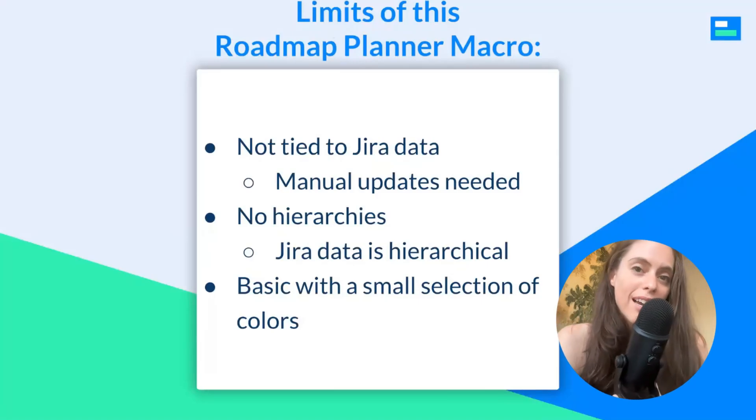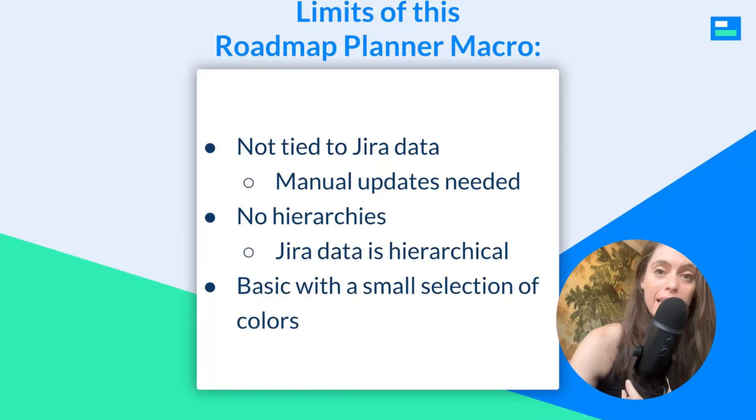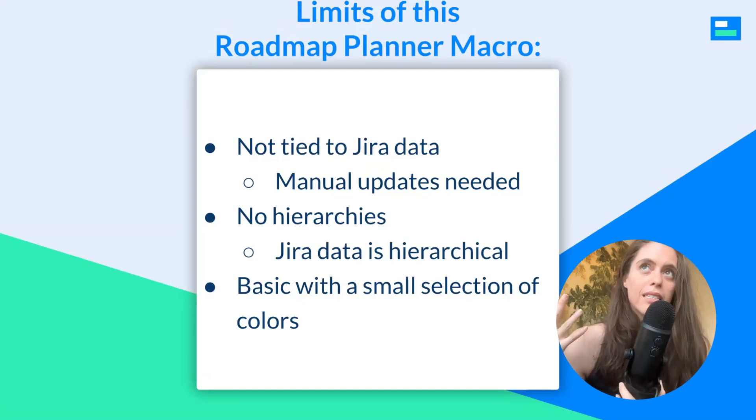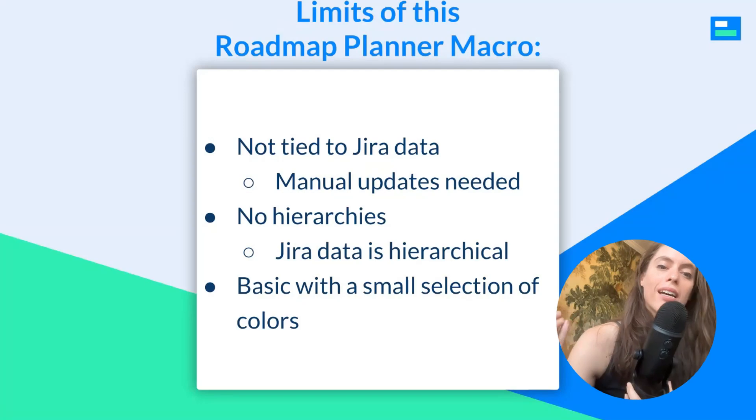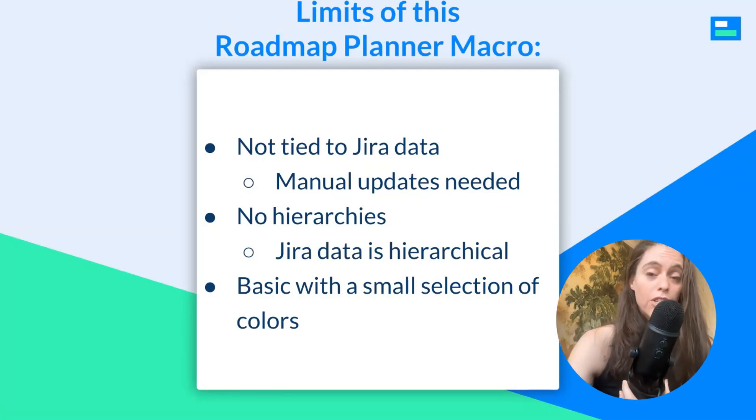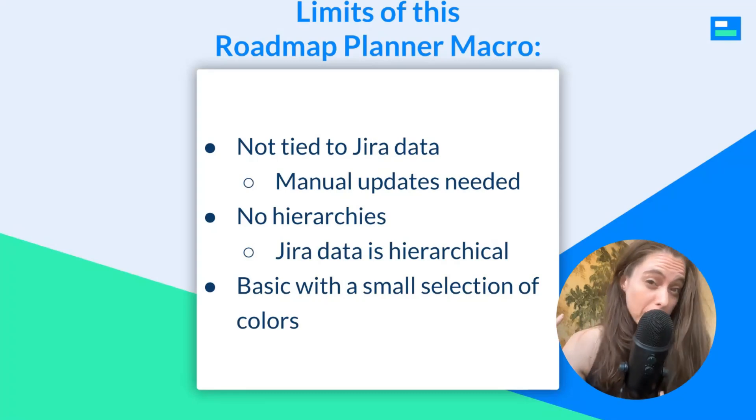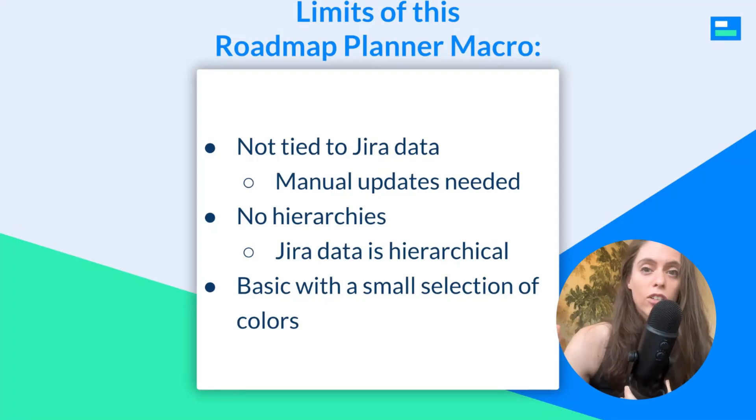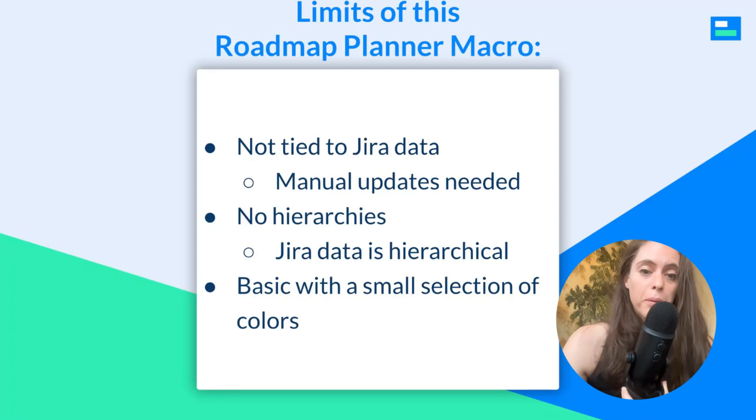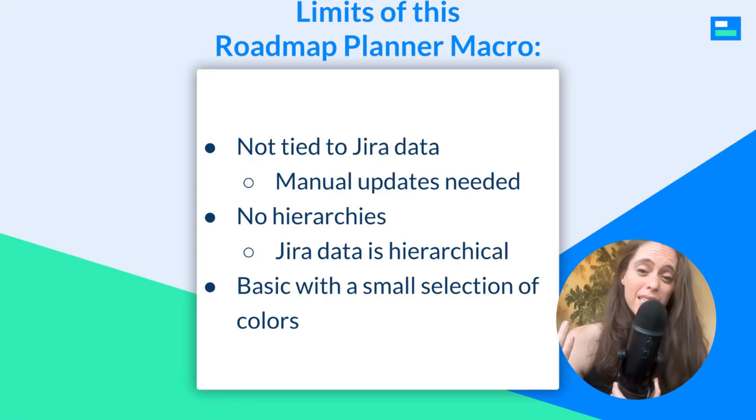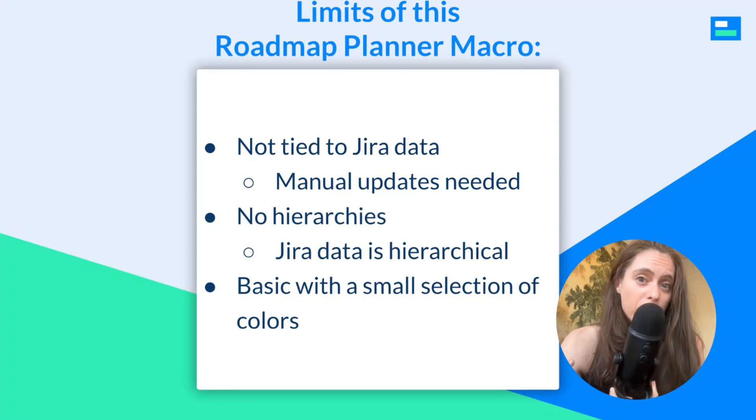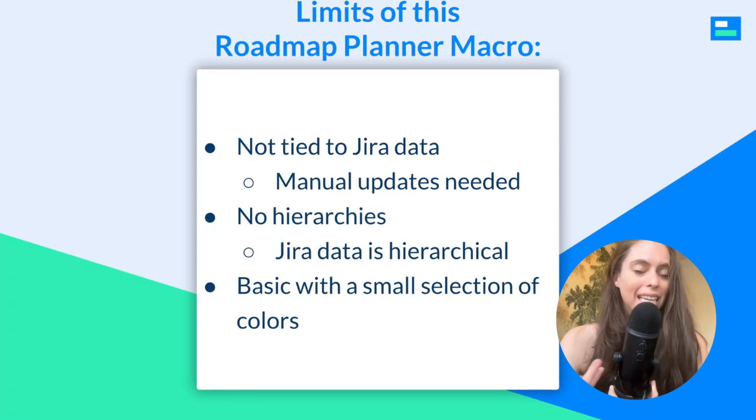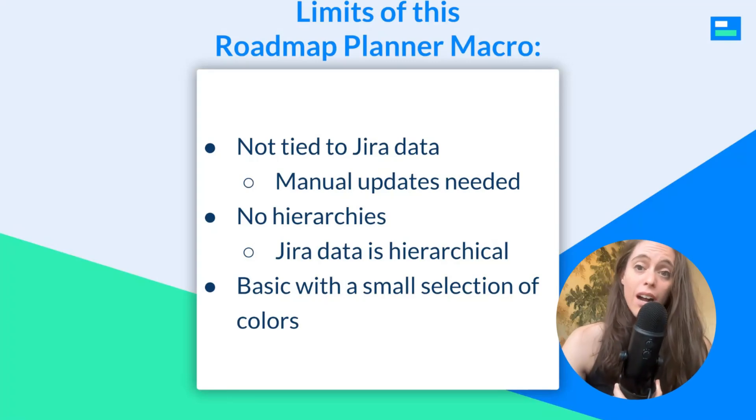Now, the limitations of this roadmap planner macro, it's not actually tied to JIRA data, so you'll have to manually be updating everything here. Also, because it's not really tethered to JIRA in any way, the concept of data hierarchies, which is found in JIRA, and I'm assuming if you use Confluence, you probably use JIRA, and have set your data up in the hierarchical way that JIRA is structured around. That will not be displayed here, and also, as you saw, there was kind of a basic small selection of colors, not a lot of visualization going on, and so it might not be as engaging as other roadmap or Gantt chart options.